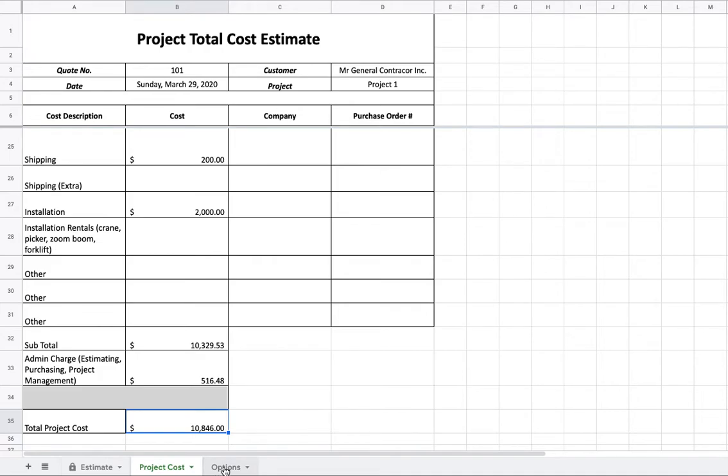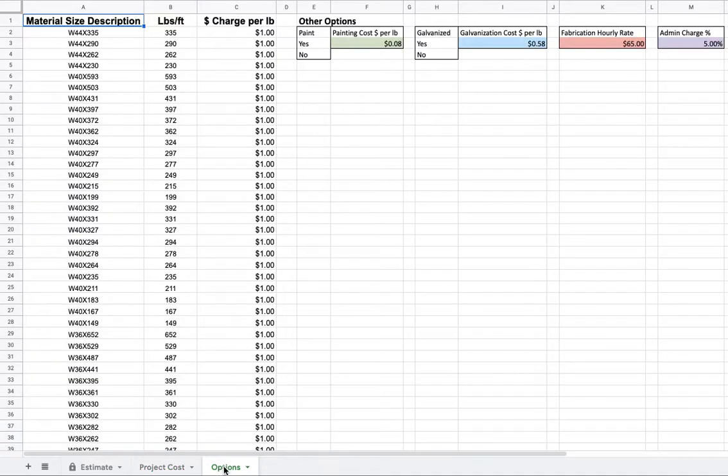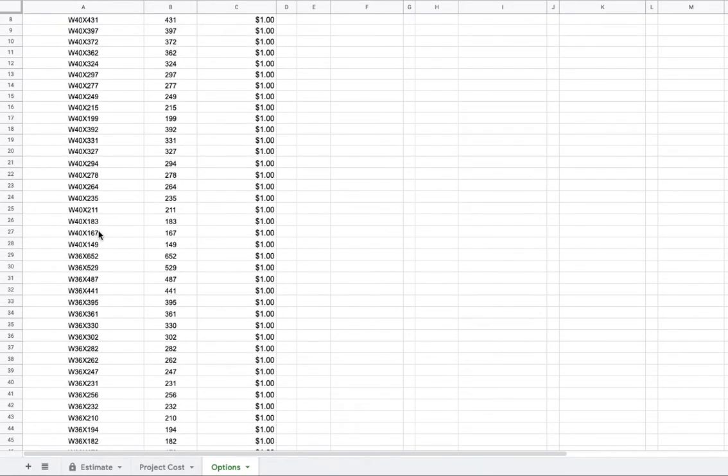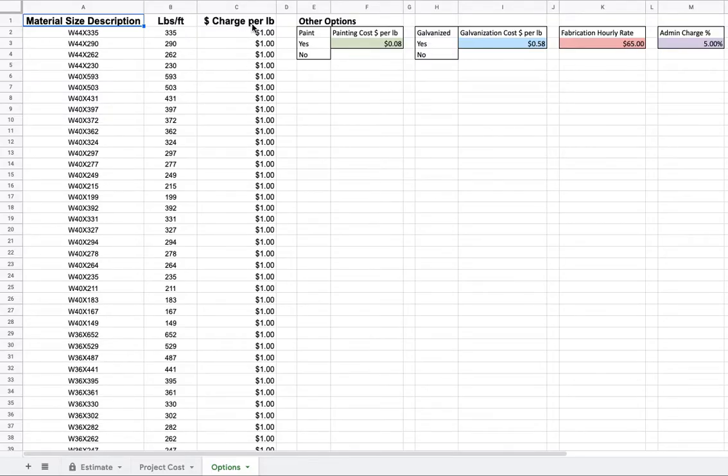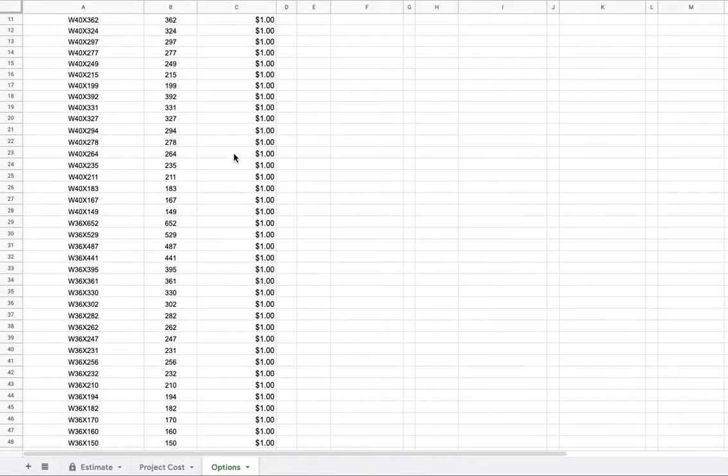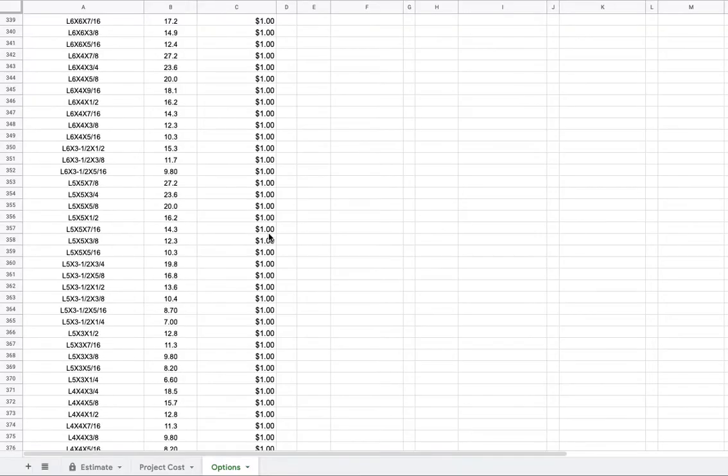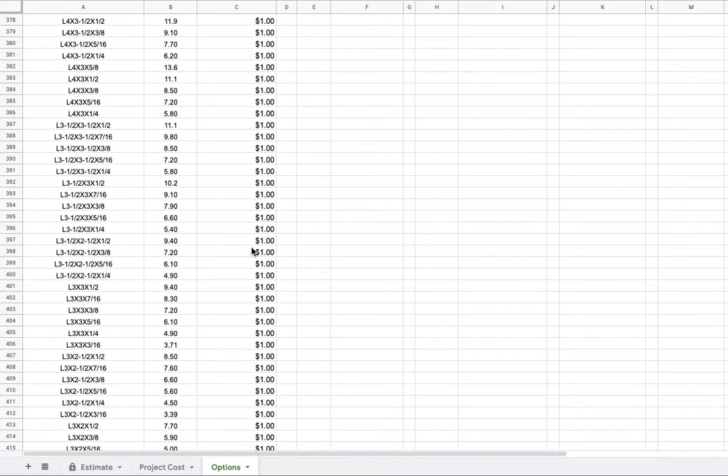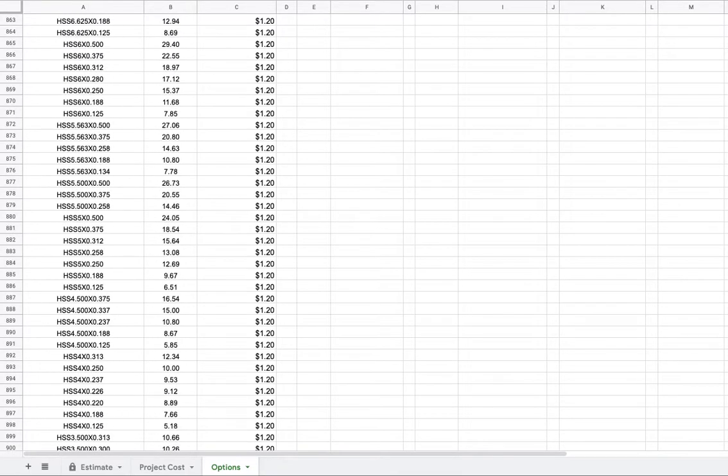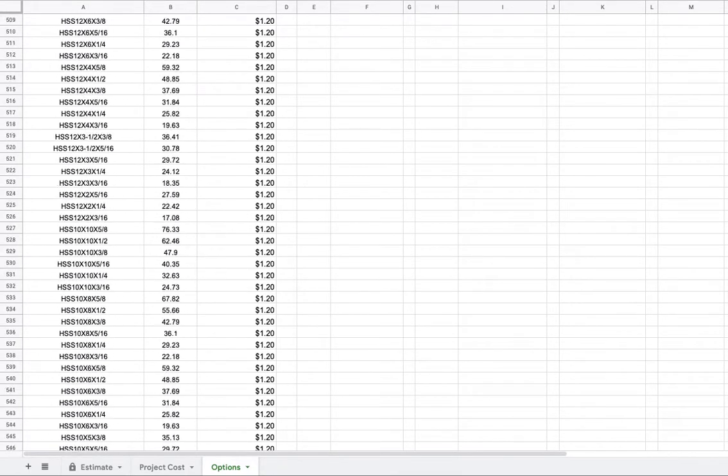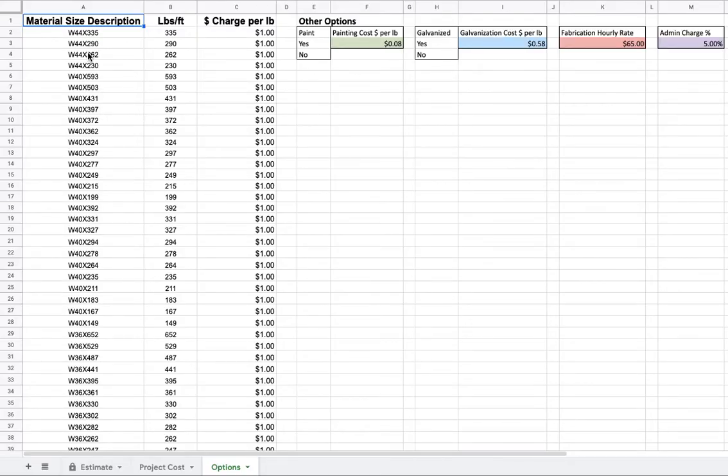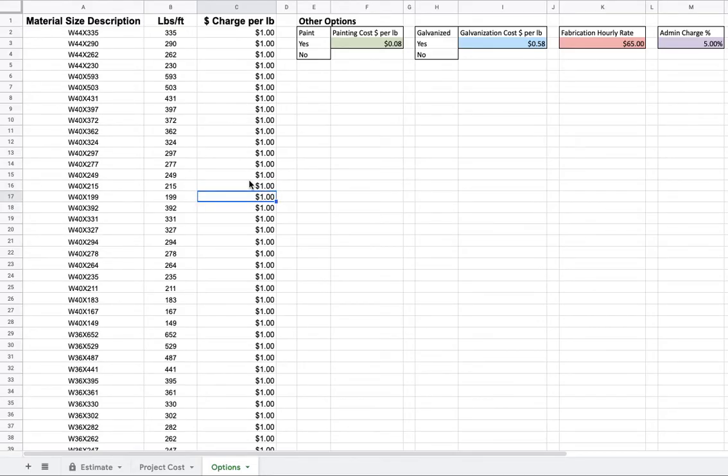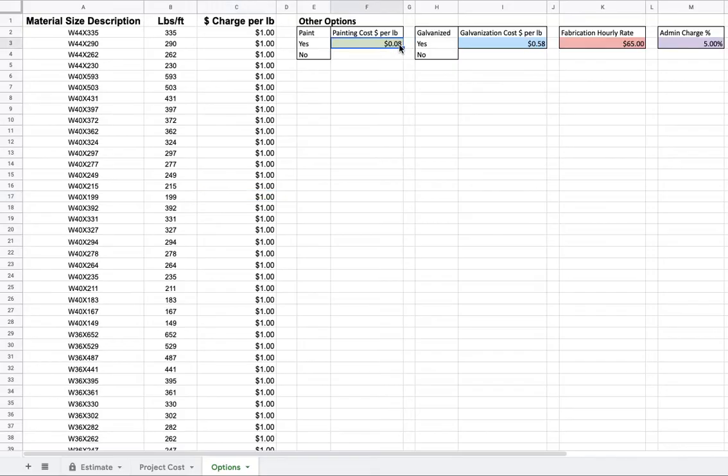Okay. Let's talk about all those things that I was talking about earlier here. This is the option sheet. It's got material size description. It's got all these, this is where all the data is stored for all these material sizes and weight factors. And right here is your markup charge per pound. You can customly put this together. I just put it all at one. You can change it depending on your local supplier price. You can change anything you like. If you need a W40 at 215 beam and you find a really good price on it, you can change that. You can make this 60 cents if you'd like, and then that will give you a more accurate price. You can also make it higher if you can't find it or you got your estimate from your supplier and you're getting charged a lot.